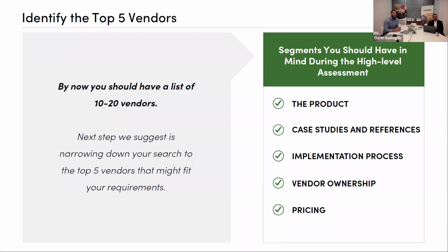Implementation process is something that is crucial. You should check if the vendor is offering on-site implementation. Is it with you every step along the way until there is a go live? By our experience, this creates a successful adoption amongst the team rather than just leaving you on your own to figure it out.